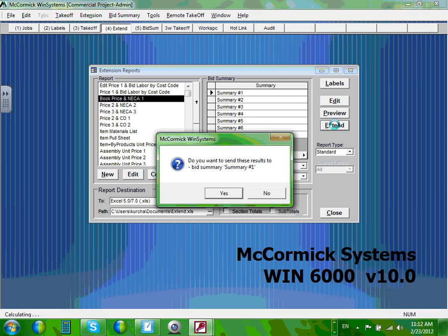Now, did you guys get this message? No. Okay, now, here's what happened. The software did the math. If you took 5 receptacles, each receptacle is $5, it takes 5 times 5, $25. And then it adds the conduits to it. So it will give you a lump sum of the price and the lump sum of the hours.